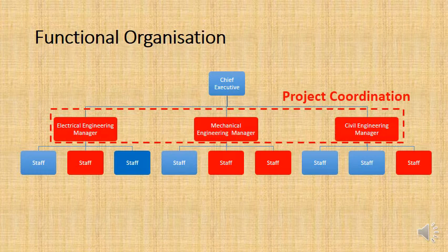That means this functional organization structure for project management only really seems to work for very small projects with a short duration, a short budget, and low risk. For really big projects, you need to start using a matrix structure or projectized organization, which we will get to.